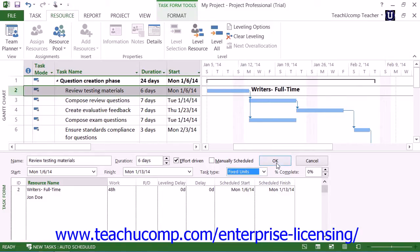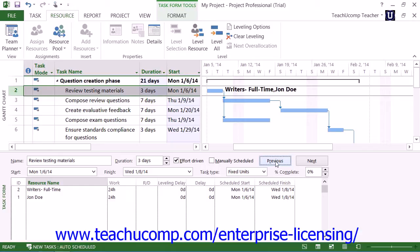When you click the OK button in the task form to save your changes, Microsoft Project will use effort-driven scheduling on this task and recalculate the duration of the task while holding the actual units of work performed as a fixed value. This will cause Microsoft Project to decrease the duration of the task based on the extra work that the second resource can perform.